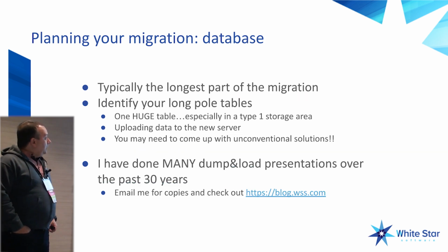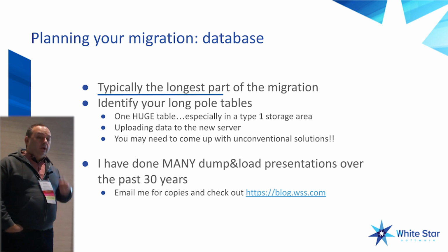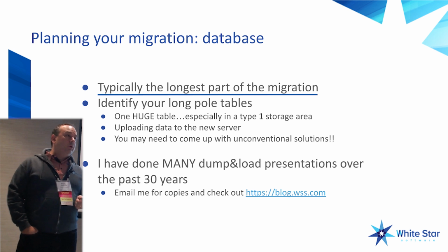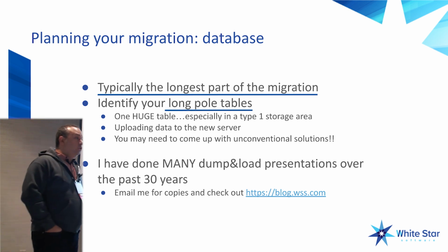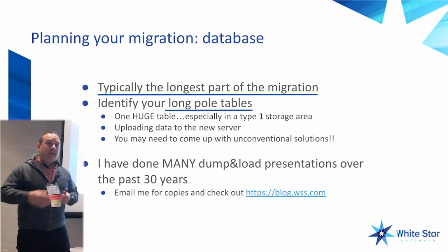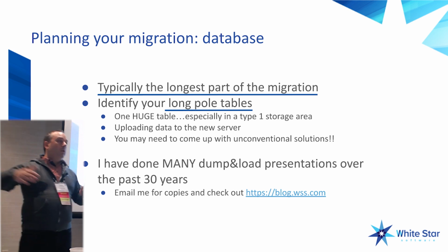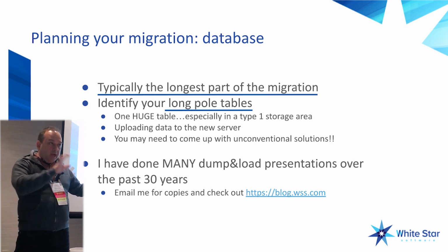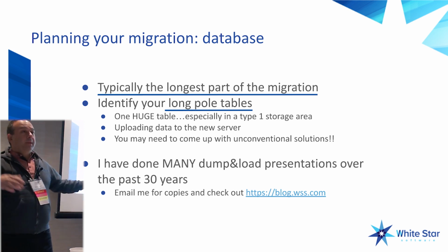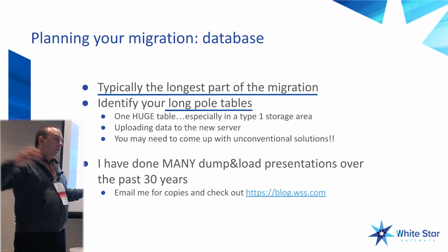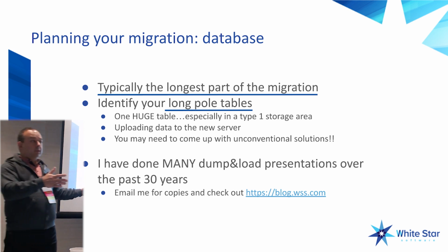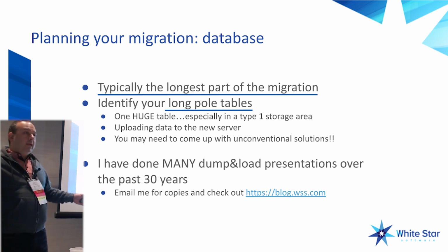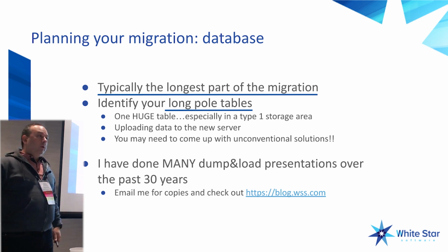Good. And the database. Typically the longest part, and not only is the dump and load typically the longest part of the migration, there's usually one or two, we call them long pole tables. So there's usually one or two tables in the database that are going to take the longest to dump and the longest to load, and they will actually define the length of your dump and load process. Everything else can kind of happen in between the dump and load of these one or two very, very large tables. And especially true if you're dumping from a type 1 storage area, because that very large table will be written across the entire physical database, which means you're reading the entire database when you dump and load.